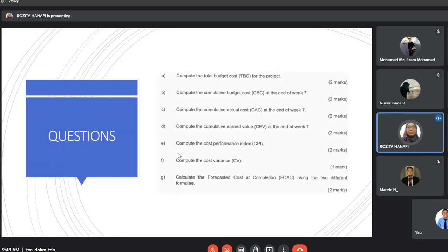And then CEV is 815,500. So the answer is 992,500.